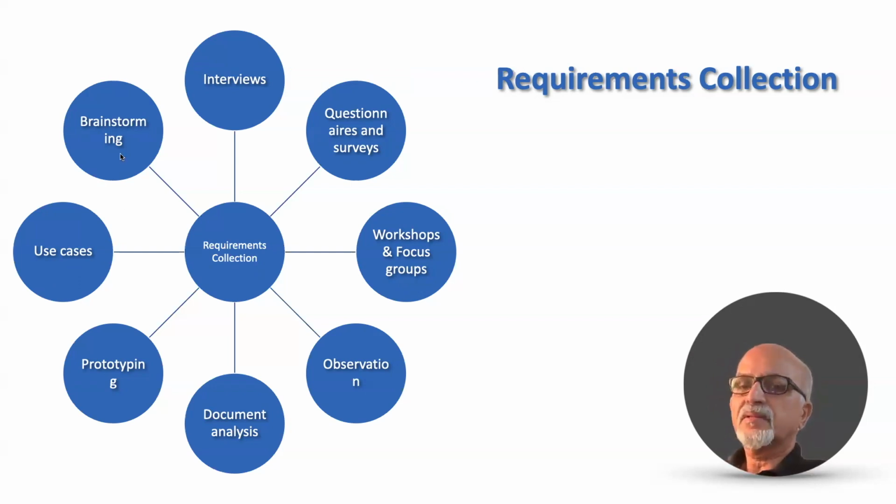Then brainstorming is about a group of people getting into a room and brainstorming about ideas. The key thing here is there is a moderator, and while brainstorming, there is no validation of the ideas. Then, as discussed, for interviews and these other techniques, the key thing is we need to factor in the time and cost required for all of them into the schedule as well as the project budget. That is the key aspect. We cannot miss them out.